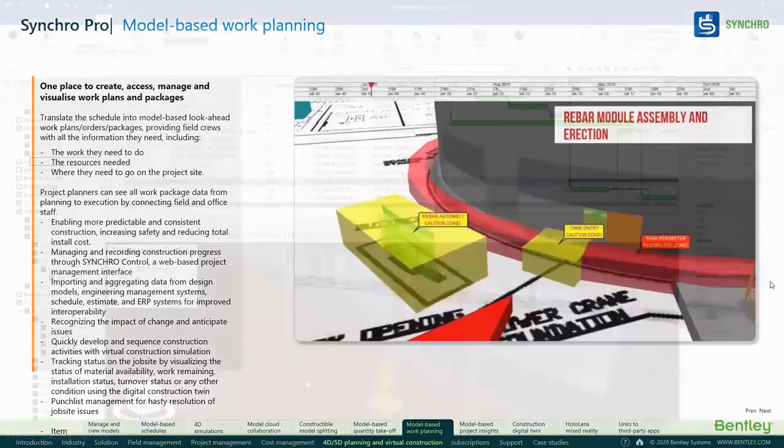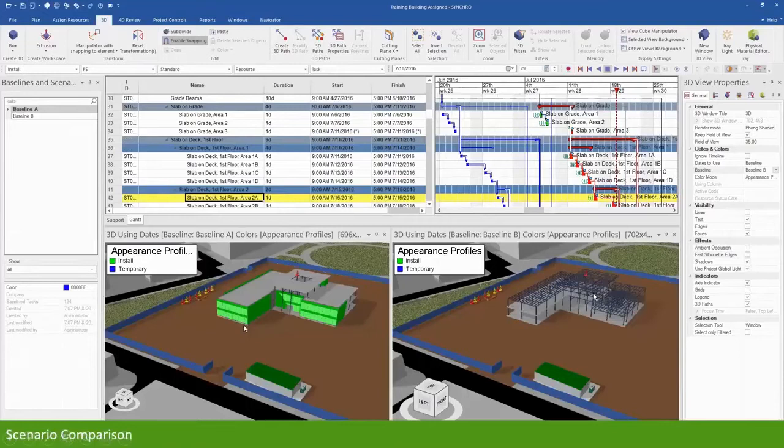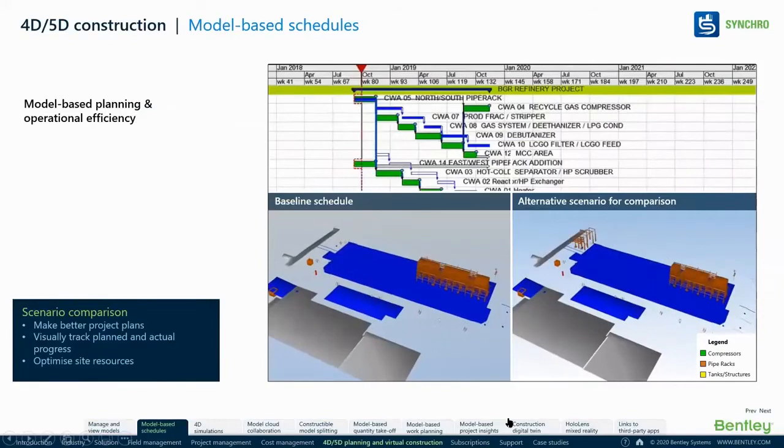So next, you can do a scenario comparison. You can do a baseline. There is a question always asked of me: how many baselines can be created? You can create as many baselines as you want, to create your plan versus actual, or maybe proposed versus actual. You could do this baseline on the 3D. So this is an example where we have done a plan versus actual.